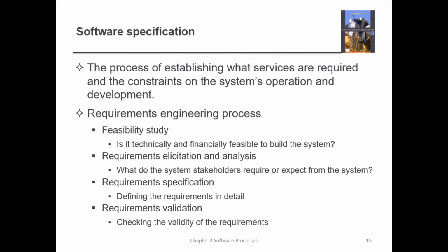First, you do what we call the feasibility study. You try to make some research, that is, you do a thorough study. And here, first of all, you are trying to understand if really the system is worthy. Is it possible technically? Do you have the expertise to do the system?